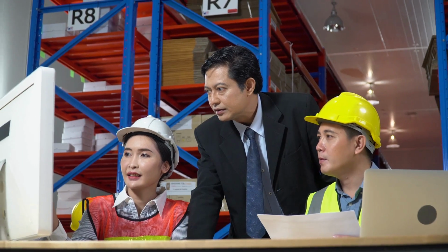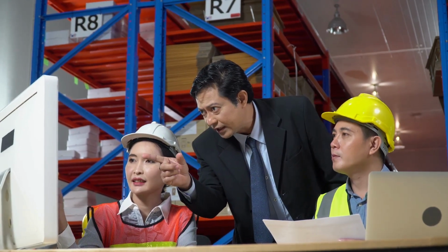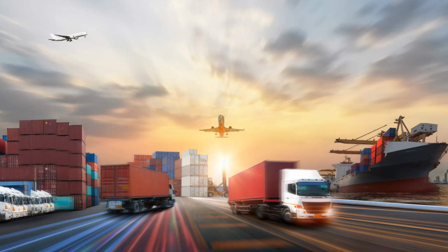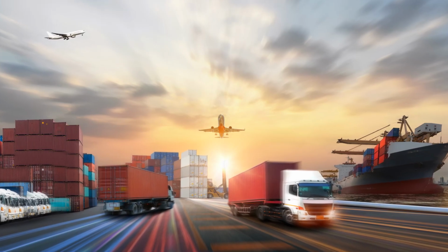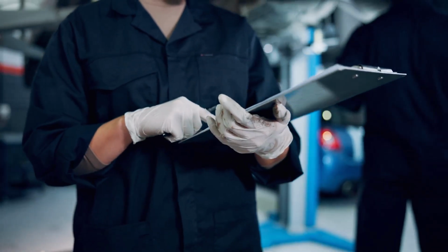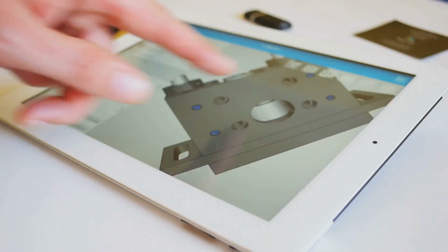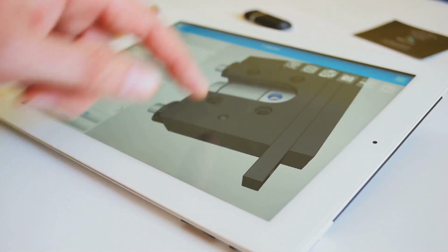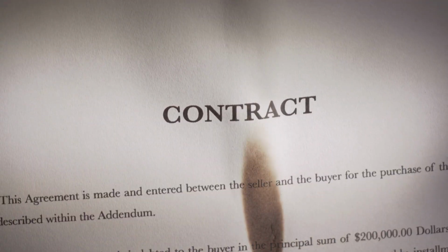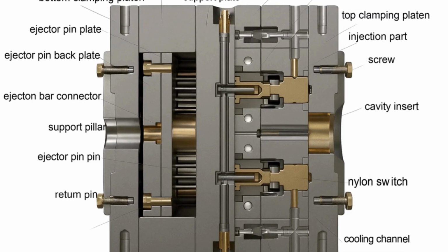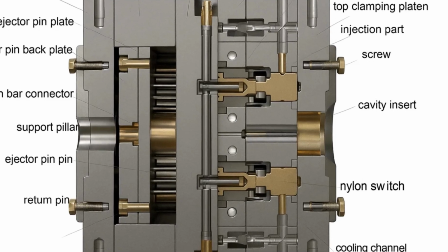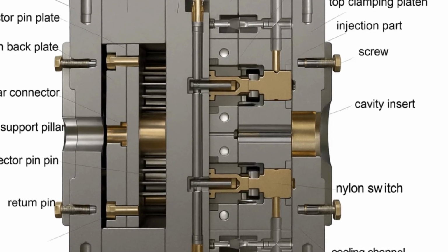Work with a reliable forwarder experienced in both countries. Ensure customs clearance and always insure the shipment for full replacement value. Before shipment, receive the maintenance guide, spare parts list, and final 2D and 3D mold design files. Reconfirm after-sales support and warranty terms. Managing these final steps ensures the tool arrives safely and you are prepared for long-term production.